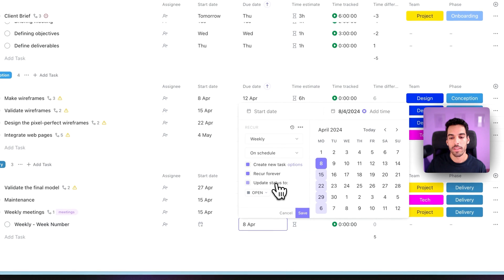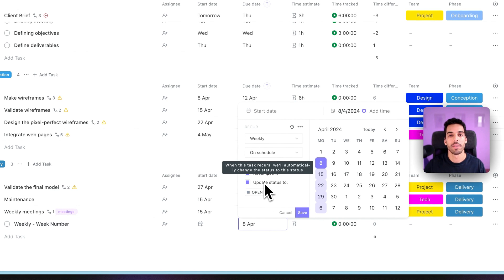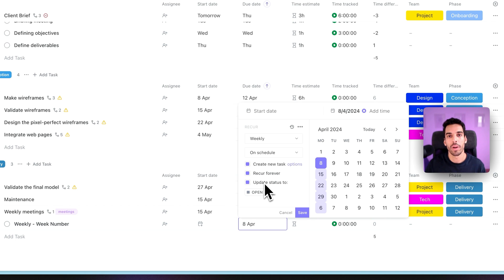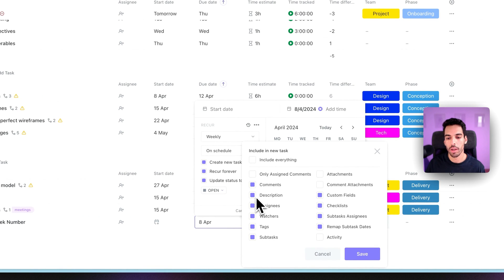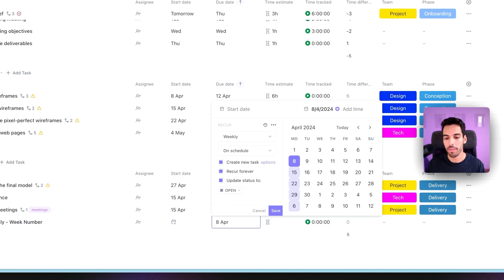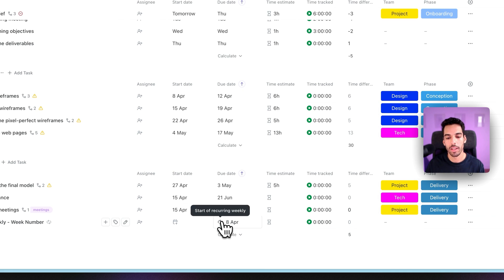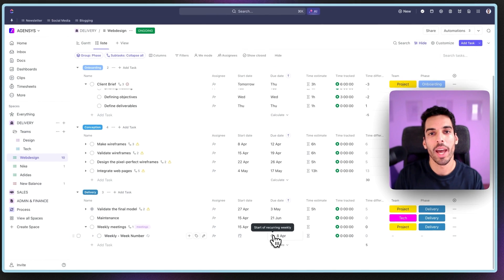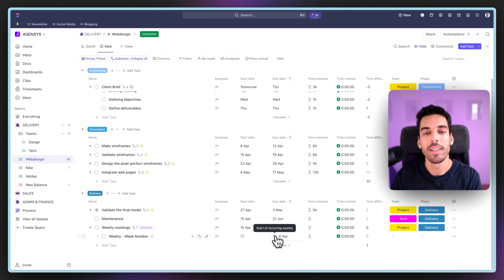I'm going to update the status to open. That means that if the previous weekly meeting is in a certain status — say it's done or in progress — the new one will be open, so each time it's a brand new task. Before saving, go into options and tick off the comments. You can also tick off the description if you've added specific information. You want to do that because if you use the comments or description for that previous weekly meeting, it will copy to the new one and we don't want the previous week's information carrying over. I click save and then save again. There's a little cycle icon that appears, telling you it's the start of a recurring weekly meeting. That's a great way to automate that aspect so that each time we start a new client project, we know there's a recurring weekly meeting task pre-set up.